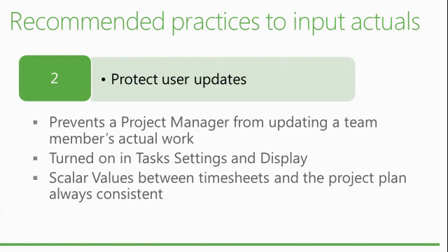So you want to prevent these updates from being overridden by the project manager by protecting these user updates. Everything that is entered on the timesheet with a single entry mode, as long as you check this box to protect the user updates, will be prevented from being overridden by the project manager. They will always be kept as they were entered in the system. Okay? So you can turn that option on in the task settings display.